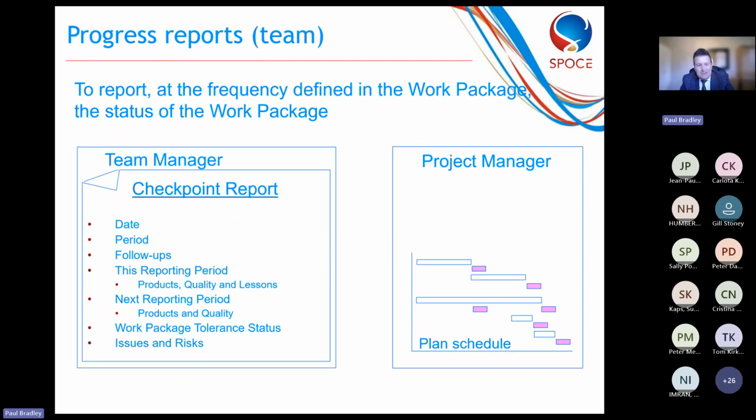Okay, with regards to progress from the teams, we have checkpoint reports or team progress reports, call them what you like. Typically they'd have a detailed period for the last week or the last few days, however often you want them to be sent to you. In this reporting period, there'll be a summary of the products that have been completed, any quality statistics in terms of quality reviews that have been carried out, and any lessons that they can bring forward.